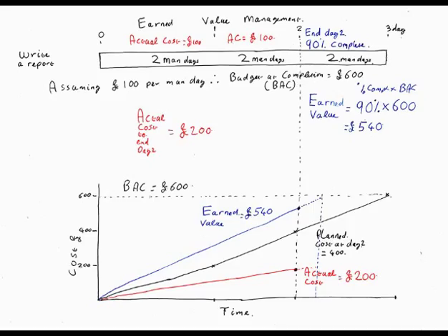Do you accrue costs then? Yeah, that's why the actual cost has to include the accruals, because these guys might not have done their timesheets yet. So the actual cost has to be an accrued cost. It has to be the actual cost plus the accruals, because I'm measuring the progress on percentage complete as of today, so the cost has to be accrued. So you need accruals by work package. You do, definitely.